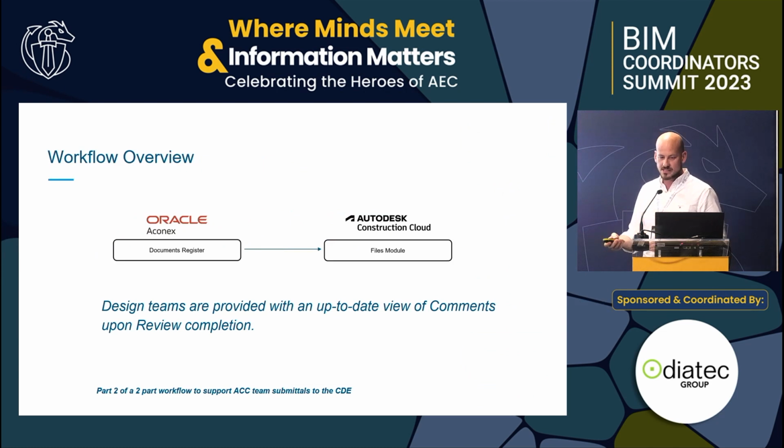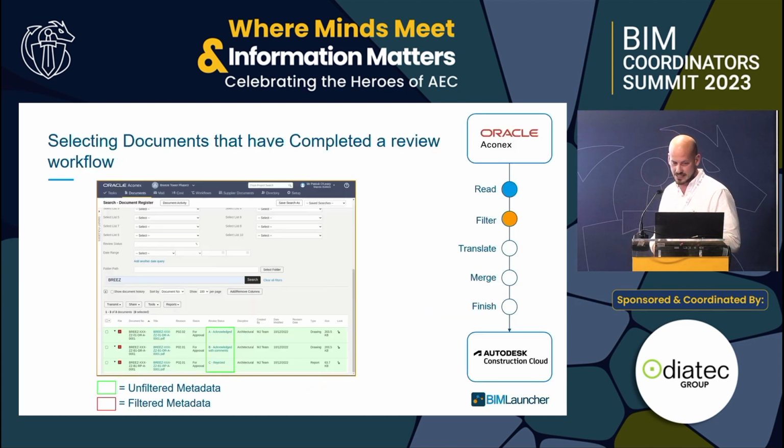Once the documents have been approved by the client in the Aconex system, the design teams or BIMLauncher would take on the role of transferring the comments and an up-to-date view of those files or documents in their review workflow back to Autodesk Construction Cloud. So the way that we do that is we would filter based on the review status.